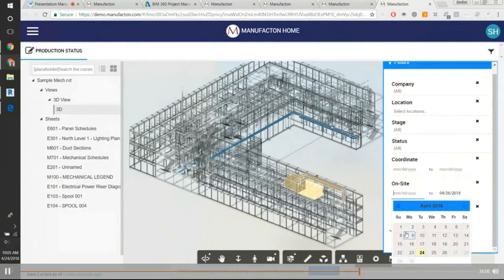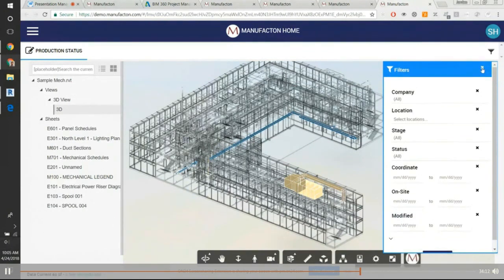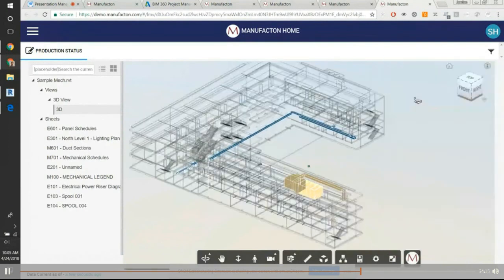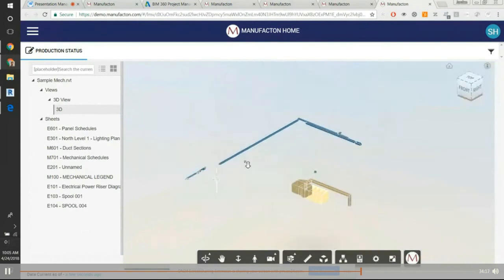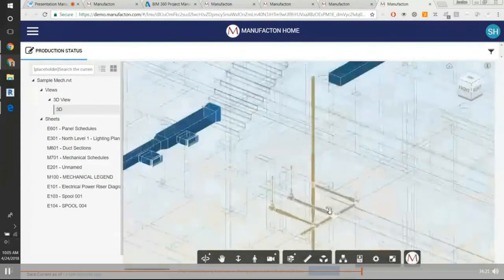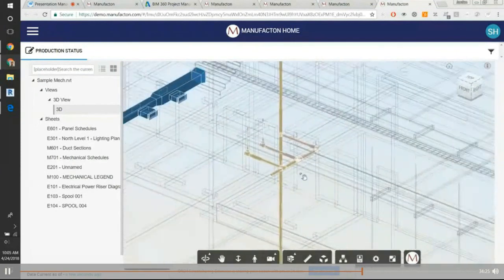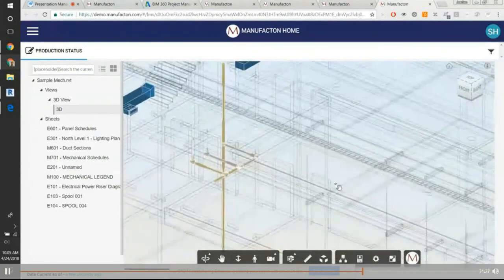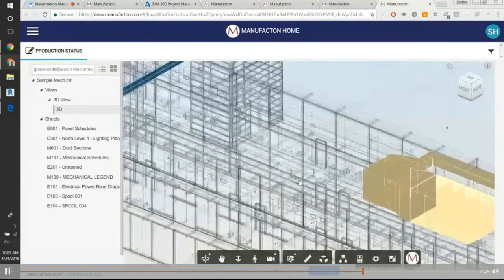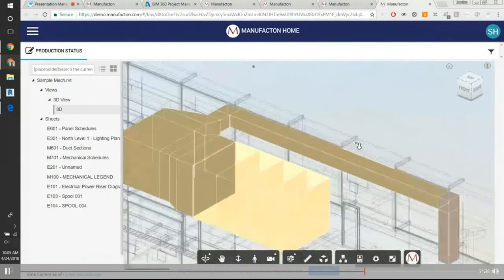And if you think back to what we saw today, we talked about the planning process. We talked about the QR codes on the job floor. So literally as the shop foreman scans that QR code and marks that item complete, this is instantly changing colors in the model. So there's no update or nothing that needs to happen. That information just flows through. So this becomes really a visual report, if you will, but all model centric directly within the Forge and Docs platform.